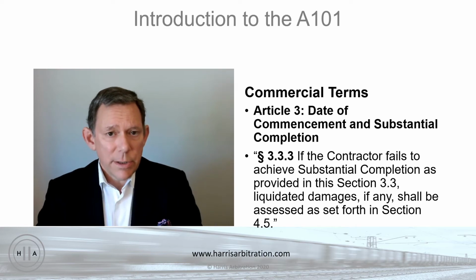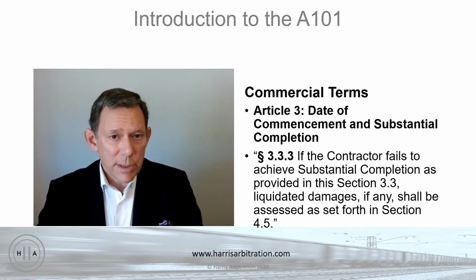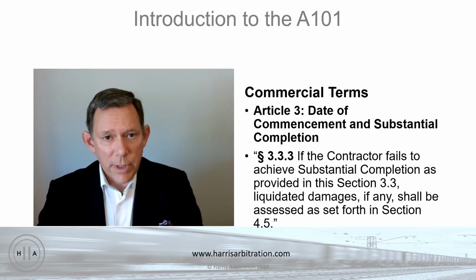And this is designed to liquidate or determine in advance what the owner's damages are going to be for a late project, because the owner may have all sorts of costs that the owner is incurring, financing costs, lost revenue, etc., that may be difficult to calculate. The financing costs are probably not going to be difficult to calculate because they'll be whatever the additional interest is on a bank loan for the construction, for example.